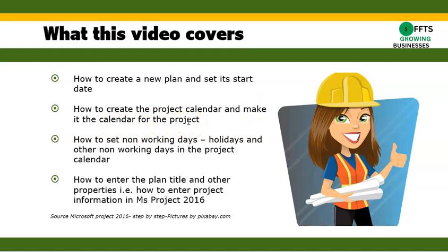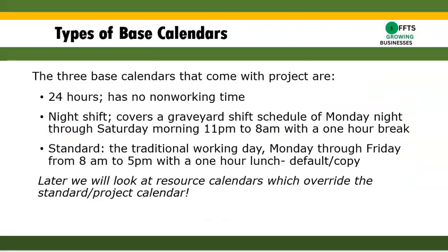And you may ask, well, why, having started the plan, are we going to the calendar so quickly? So let me just talk a little bit about project's calendar. Project has three base calendars. There's the 24-hour, which has no non-working time. What are we talking about when we say non-working time? Like Saturday and Sunday, most people don't work, so you don't want the software to be scheduling work on these days. So when we talk about non-working time, as it implies, you're not working.